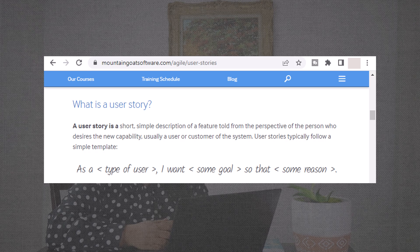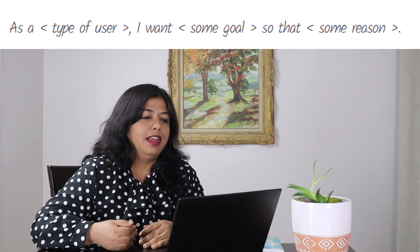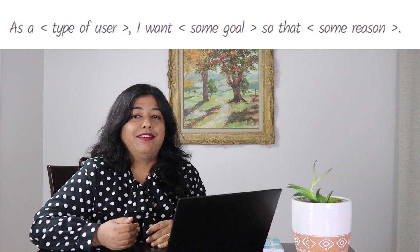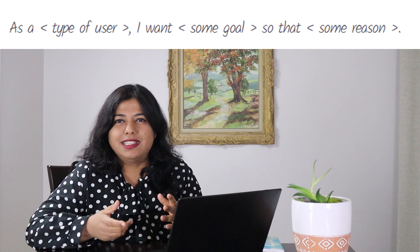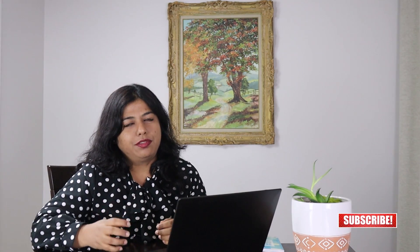User stories typically follow a simple template: 'As a [type of user], I want [some action or feature], so that [some reason or business value].' The reason captures the business value accrued from this capability being developed. Even though there is so much literature and guidance on user stories, remember that not all user stories need to fit the 'as a user' template — you might have stories related to architectural design or a security flaw that don't fit this template but are still user stories, because they represent an idea that offers business value.